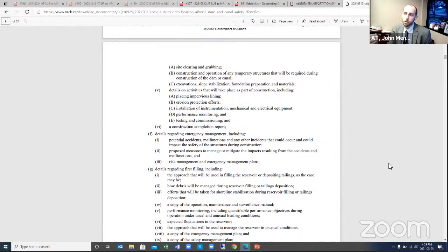When you do gate procurement and design for a project like this, you don't specify one manufacturer or one supplier. You put it out for bid with performance specifications. Then the contractor procures something that meets those requirements, and it's reviewed and approved by the government. So we can't write an operations manual until we know what specific equipment needs to be operated.